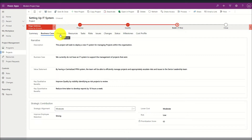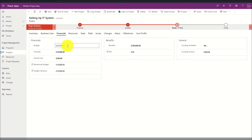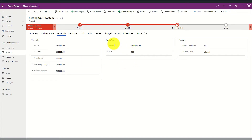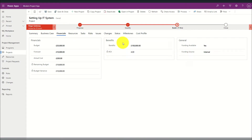Next I have a custom financials tab where I can see a budget against my project, the forecast spend, and the actual cost spent so far. In addition there is a summary of remaining budget and budget variance, which is a calculated field. I've also created a second area defining the total benefits given for the project, and a return on investment score is automatically generated. A third area defines where the funding is available and the source of the funding for the project.